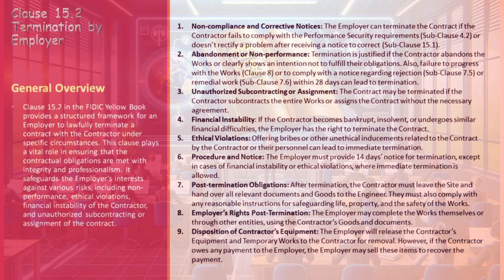Unauthorized Subcontracting or Assignment: The employer may terminate the contract if the contractor unlawfully subcontracts the entire works or assigns the contract without necessary approval. Financial Instability: Bankruptcy, insolvency, or similar financial difficulties faced by the contractor allow the employer to terminate the contract. Ethical Violations: Any form of bribery or unethical inducements related to the contract is a serious offense warranting immediate termination.